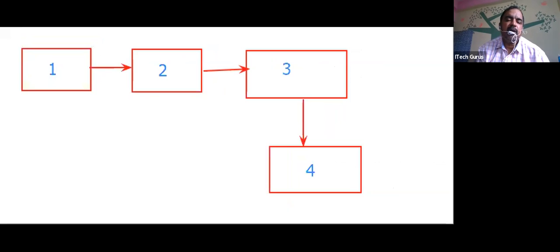So here, what are you trying to do? I'm just fixing it at 2 weeks. Now this 2 weeks is nothing but the time boxing for the whole project. That means every 2 weeks, I need to keep delivering a small product to the customer. A small workable chunk of product. So that is what is given here. And I need to keep on producing it, and I keep on updating it. I keep on improvising that as I move on. So that is called time boxing.